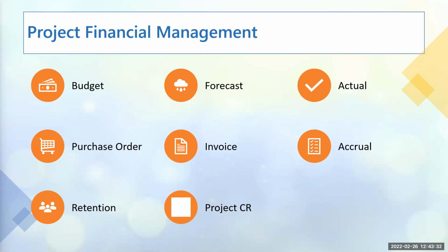Sometimes the accruals can be claimed before the invoice is sent out to the client, or it could be sent as part of the next month. So you could add it as part of your next month forecast because of the work that has been done prior, like it's been done in the previous month. And it's all up to the finance team to make sure that all accruals are reversed once the information has been entered into the system. So you don't need to worry your head too much about that.